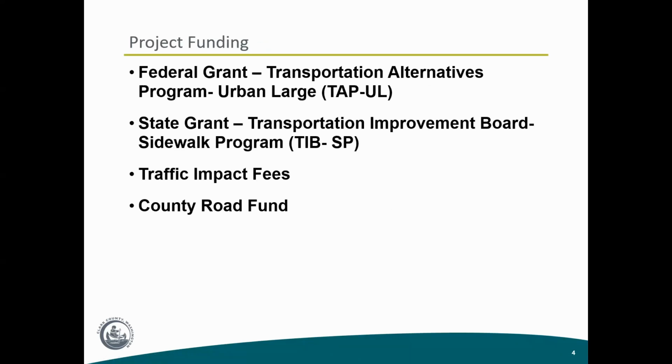We have a state grant on the project. It came from the Transportation Improvement Board Sidewalk Program. That was about $300,000. We're going to be using county traffic impact fees and then the county road fund in the amount of $700,000, I believe. The total project, and when I say total project, that's the design, securing the property, and then the construction phase, is $1.7 million.